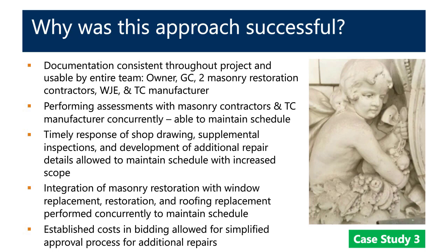The integration of the masonry restoration with window replacement and restoration and roofing replacement performed concurrently, which was absolutely necessary to get this project done on schedule. And then establishing costs in the bidding, again, allowed for that simplified approval process for additional repairs.